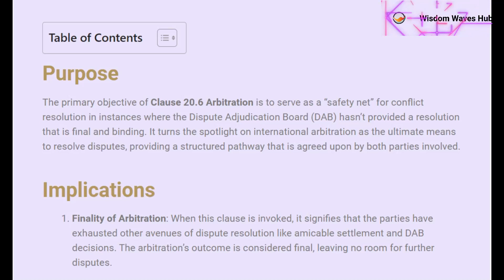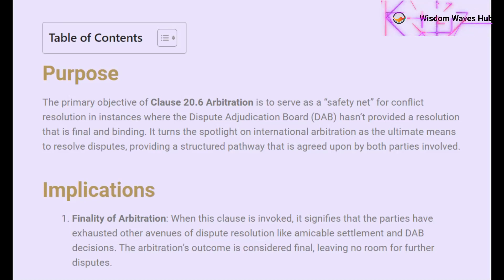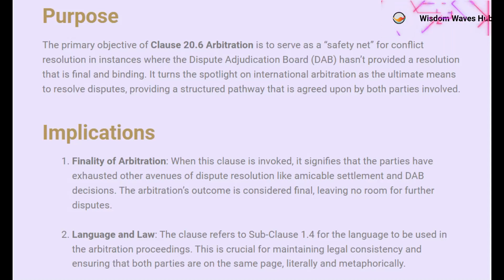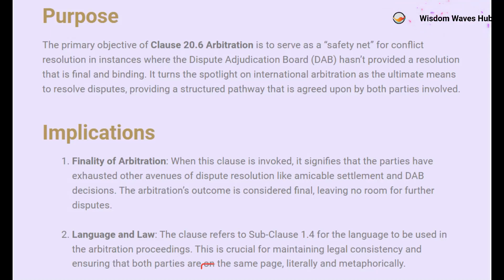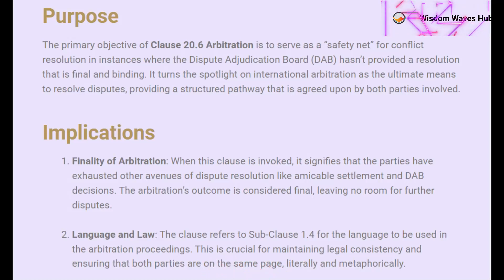Let's also understand what adjudication means, as it's another term often used in the context of dispute resolution. Adjudication is an accelerated form of dispute resolution wherein a third-party adjudicator provides a decision that is temporarily binding. It's a quicker process, aimed at resolving disputes as they arise, particularly useful in construction projects where time is often of the essence. Unlike arbitration, adjudication decisions can be reviewed and potentially overturned in later stages of dispute resolution, such as in arbitration or litigation.